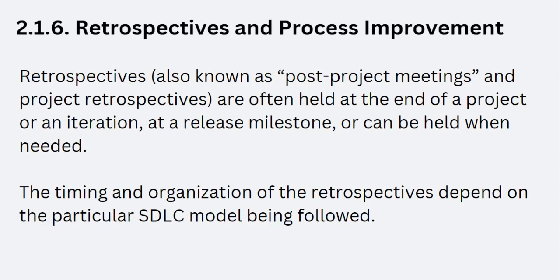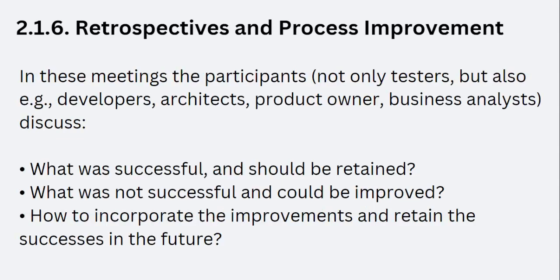Retrospectives and process improvement. Retrospectives, also known as post-project meetings or project retrospectives, are typically conducted at the conclusion of a project, iteration, or release milestone, or as necessary. The timing and structure of retrospectives vary based on the specific SDLC model being employed.